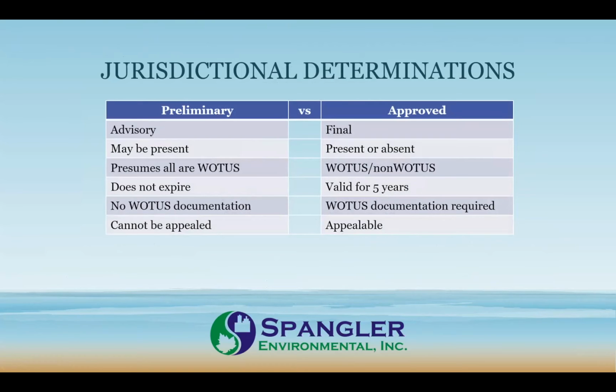For those of y'all that are not aware, a jurisdictional determination is a confirmation directly by the Corps of Engineers, very often in the field, that they confirm or adjust the location and extent of what was mapped by the permitted community consultants or others, in very few cases landowners. That's what a jurisdictional determination is: the site visit and/or review of the supporting documentation of the location and extent of jurisdictional features or the lack thereof.